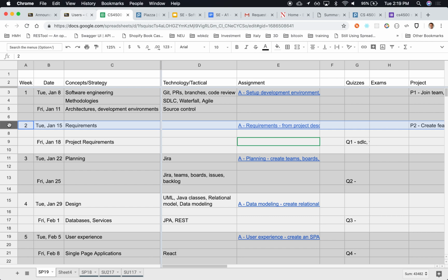We're going to be running 1-week sprints. I don't like 1-week sprints, but it's a short semester. We only have 4 months. Typically, I would prefer maybe 2-week sprints, maybe even 3. I think 3 is a little bit too long. 1 is too short. But it's academia, and we only have so many weeks in the semester. So we're going to run 1-week sprints. Okay. So every week, after we know how to plan,